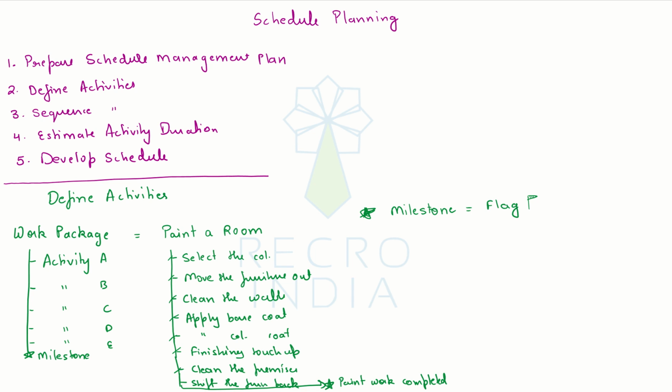So, the purpose of milestones, like I said, is to highlight something of importance, signify some important accomplishments in the project life cycle, and you can say that this can also aid your reporting mechanisms. So, instead of reporting on maybe 500 activities of a project, we can summarize the report with the help of 20 or 30 milestones that we have placed in the entire project schedule.